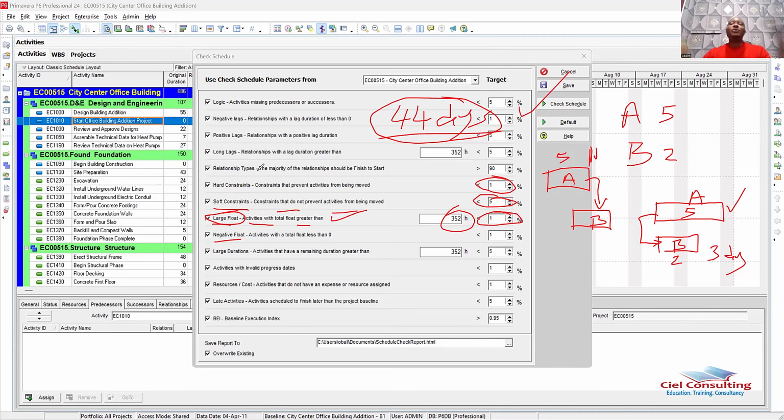So it simply means we should go and look for where to get 5 days to add, which is not possible because the deadline is 10 days, but we require 15 days to perform that particular activity. Negative float should not even exist at all in your schedule.